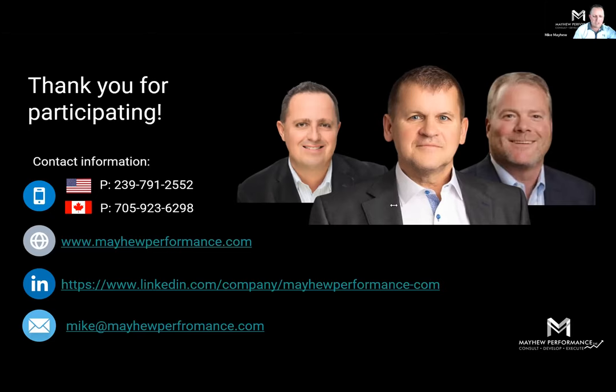And as much as I love battery electric vehicles, I had to tell one client specifically, and it broke my heart. But I think honesty is the best thing to do. He had a life of mine plan of 5 years. And I had to tell the client, I'm sorry, BEV just doesn't make sense for two reasons. One, infrastructure and location. And two, your life of mine plan just doesn't justify it. Go get some more definition drilling and reserves and resources and indicated, and then we could talk again and I would recommend it. But I'm not going to tell somebody something I don't believe in. It's not worth doing.